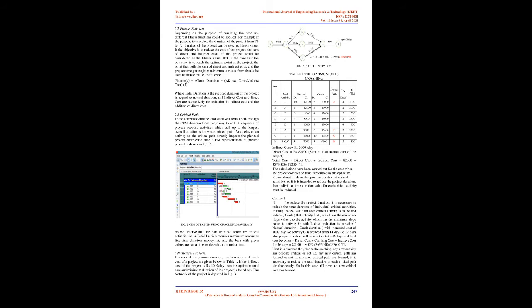Siemens' heuristic algorithm for TCTP problems: this section introduces one of the conventional algorithms for time-cost trade-off, presented by Nikolai Siemens. The main application of Siemens' algorithm concerns projects for which a predefined completion time (TP) has been agreed in the contract — a deadline before the normal completion date calculated by the CPM method. Siemens' algorithm finds the best arrangement of activities in which the project will be completed by TP while minimizing overhead cost. TI is the reducible time of activity I; DN is the current duration of the activity and DF is the forced duration. ECI is the effective cost slope for activity I; CI is the cost slope and NI is the number of paths passing through that activity that are not shortened enough. The necessary time reduction (TR) equals the current length of the path (DP) minus TP.